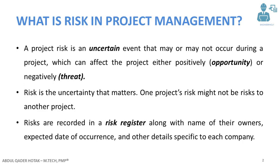Risks are recorded in a risk register. I'm going to show you how a risk register looks like in the next slide. If you want that template, please write down your email in the comment section so I can share it with you. Risks are recorded in the risk register along with the names of owners, expected date of occurrence, and other details. Each company has its specific standards and templates, so their risk registers might look different, but the contents are almost the same for all organizations.